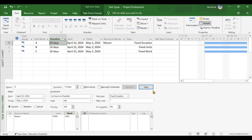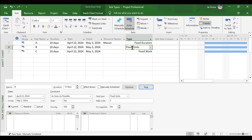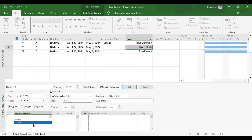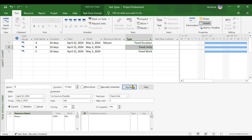Now moving to the second type of task: fixed units. Assigning one Mason and clicking OK. In fixed units, the units will not change at all — this should be very clear.